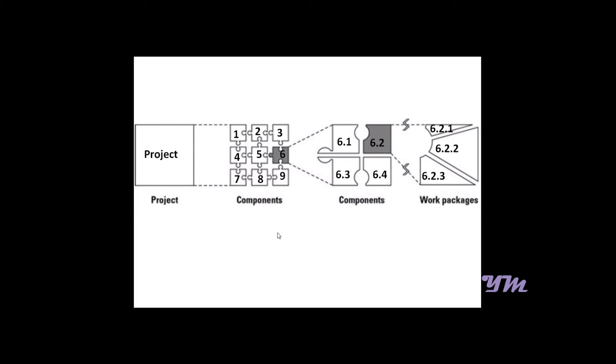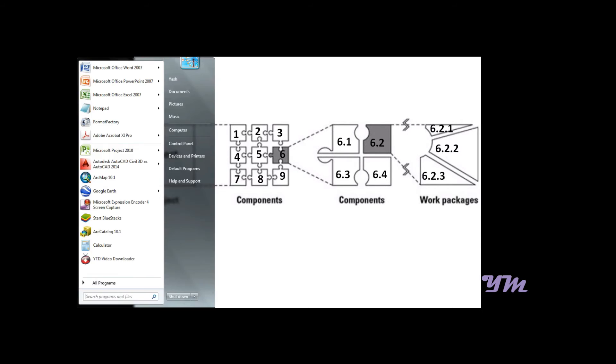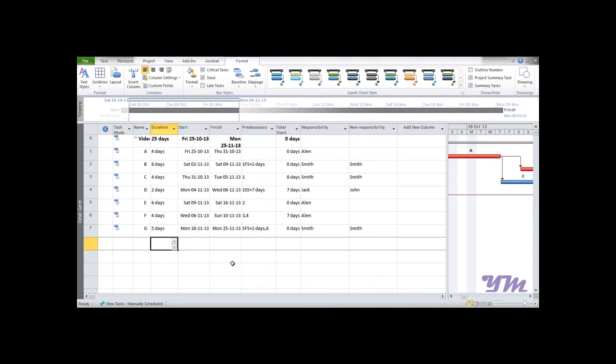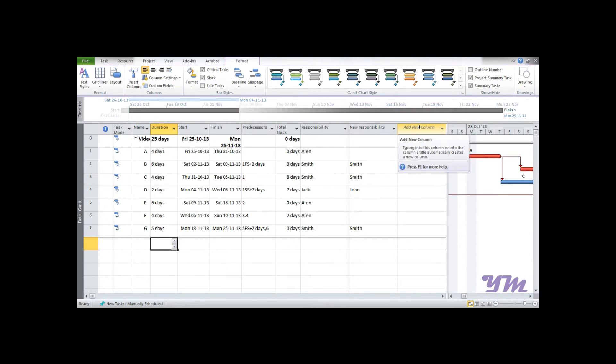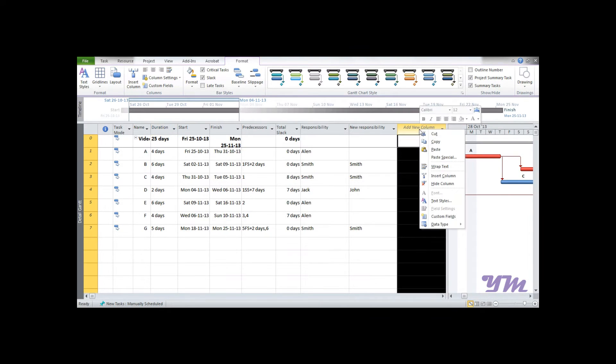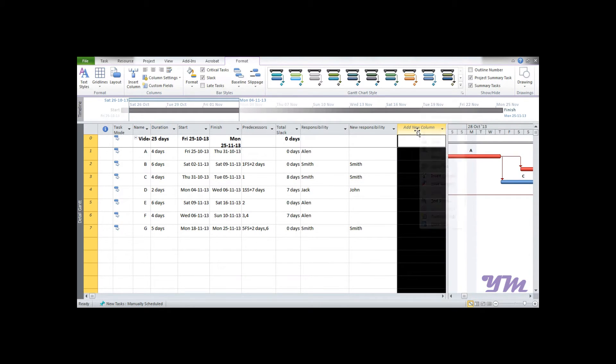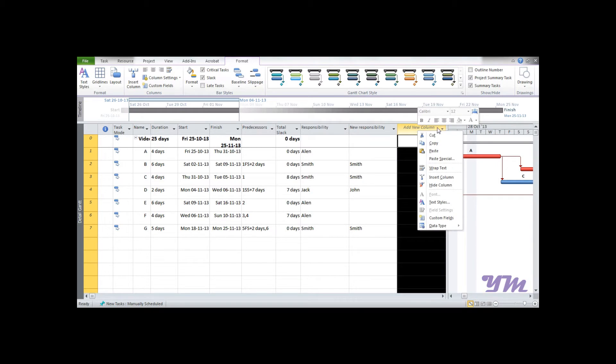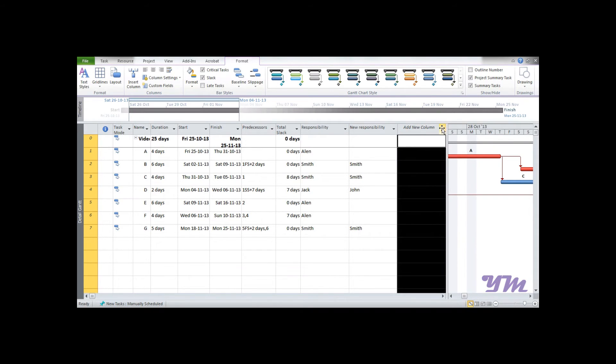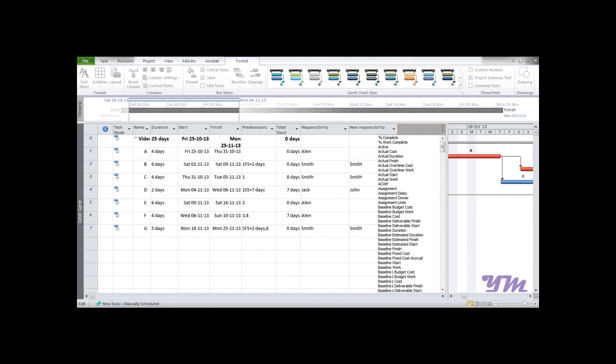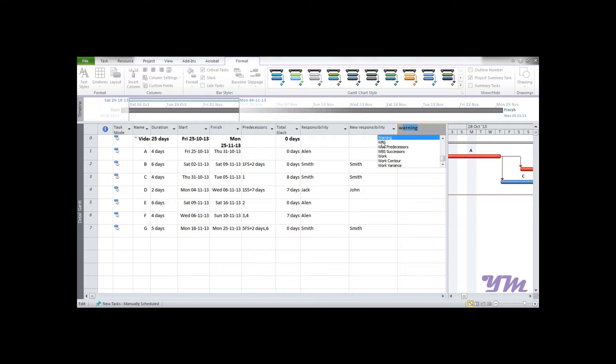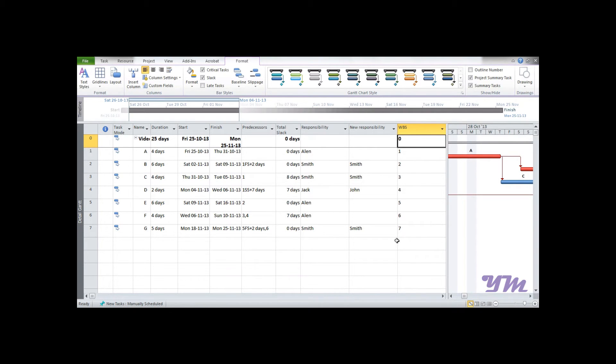Now if you want to apply the same thing in Microsoft Project 2010, it's quite simple. You need to just go on to this tab of add new column, you can right click, you can click over here and just go to W. So we have WBS. Once you click on it, the WBS is displayed over here.